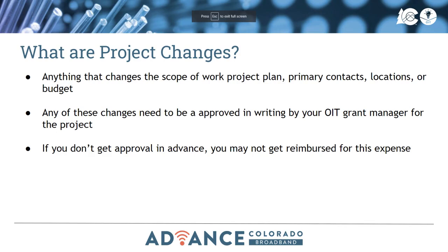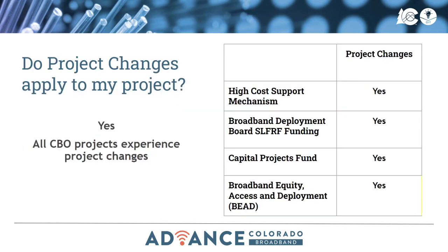The OIT grant manager will determine if a formal request must be made for the change or an informal written approval may be provided. All changes must be documented for audit purposes. The CBO will be monitoring projects to ensure that they are being completed to the specifications listed in the project plan. Do project changes apply to my project? Yes. All CBO projects experience project changes.